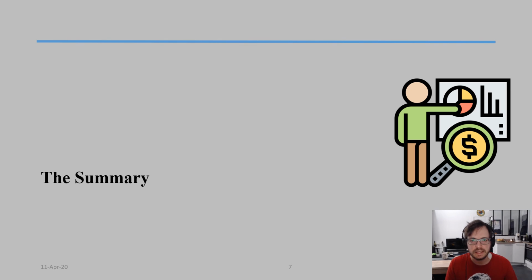So to summarize, baseline planning is extremely important because it's the basis that determines your performance. If you have a baseline plan that is more realistic, then typically you can get a better performance output at the end. But if you try to be too optimistic in your plan, it might affect your performance later on. At the end of the day, no baseline is going to be perfect because there are always things that will happen that we did not predict, positive or negative. And therefore it's something we have to be careful about.